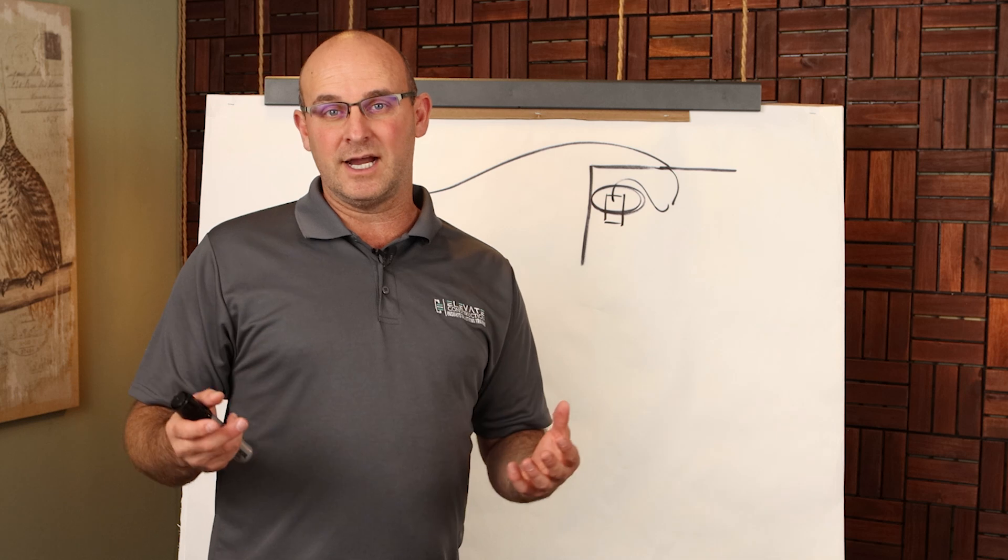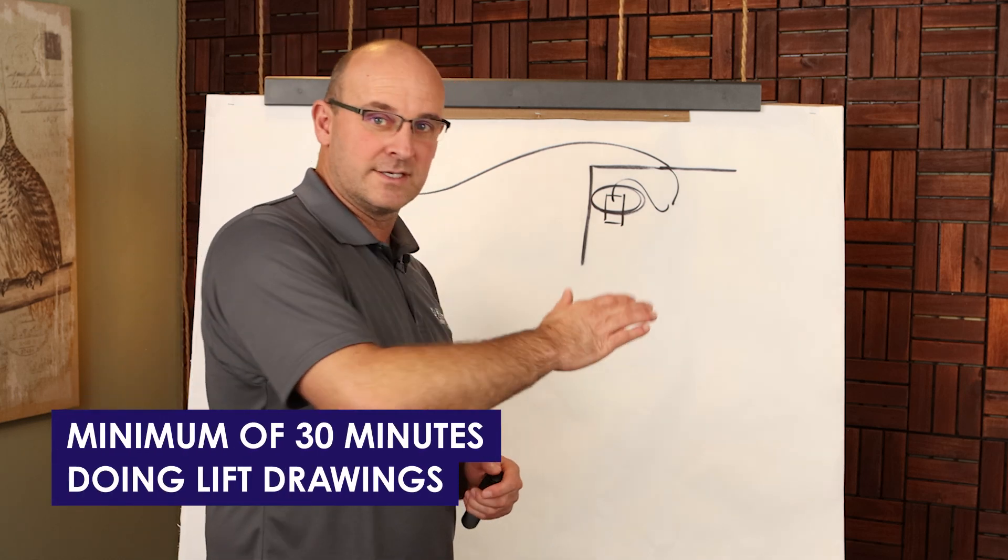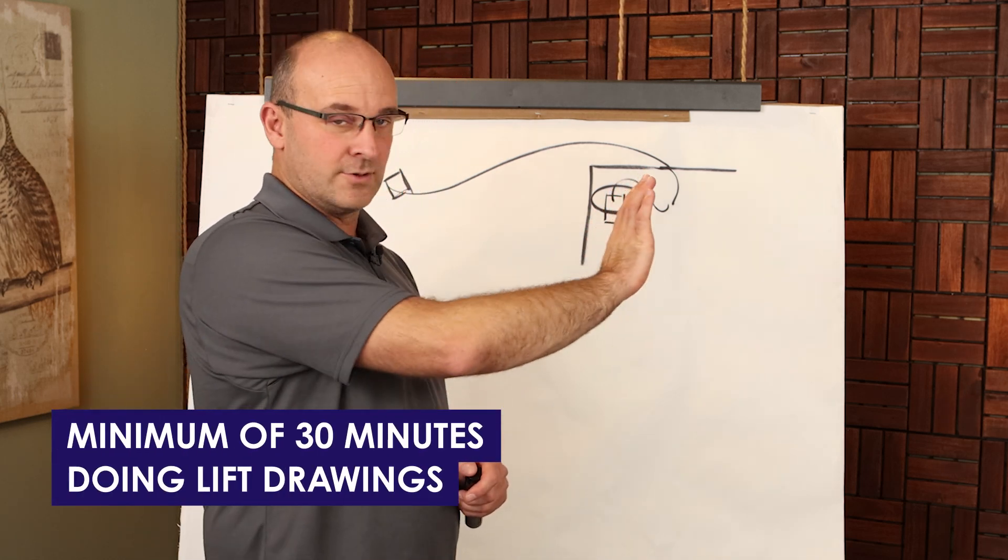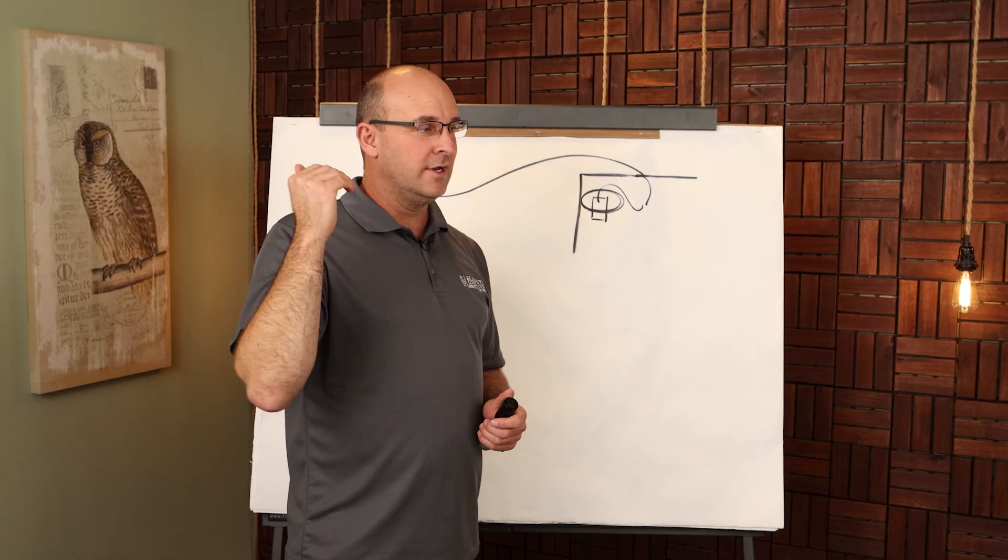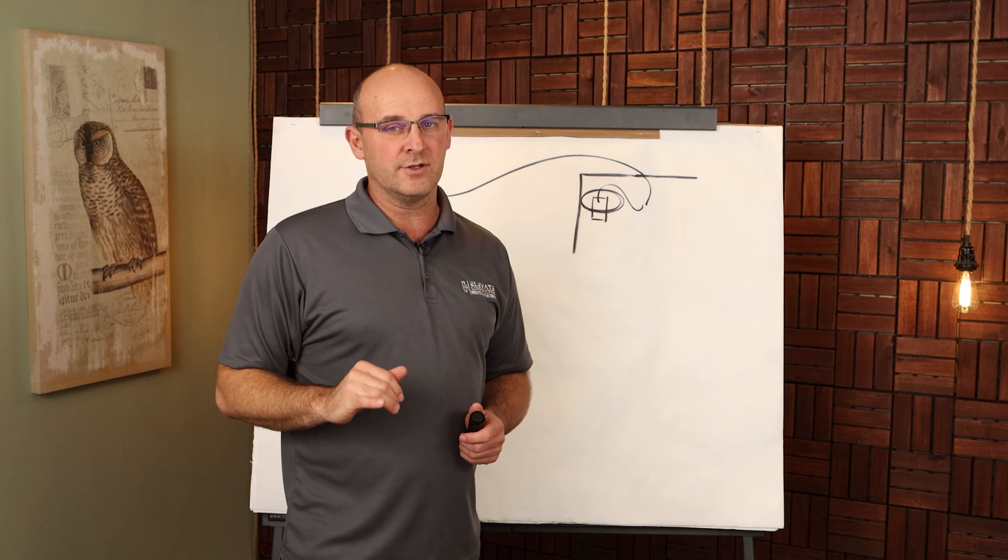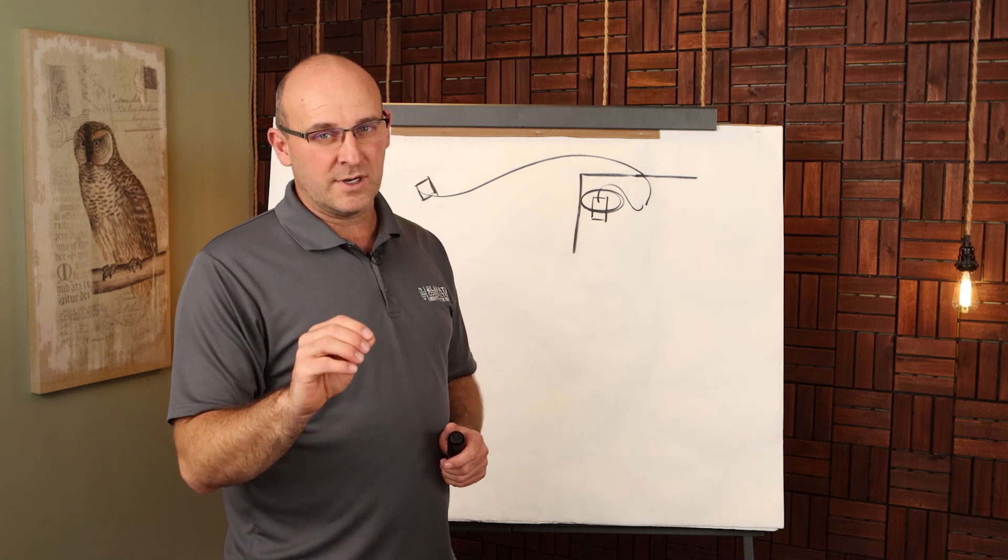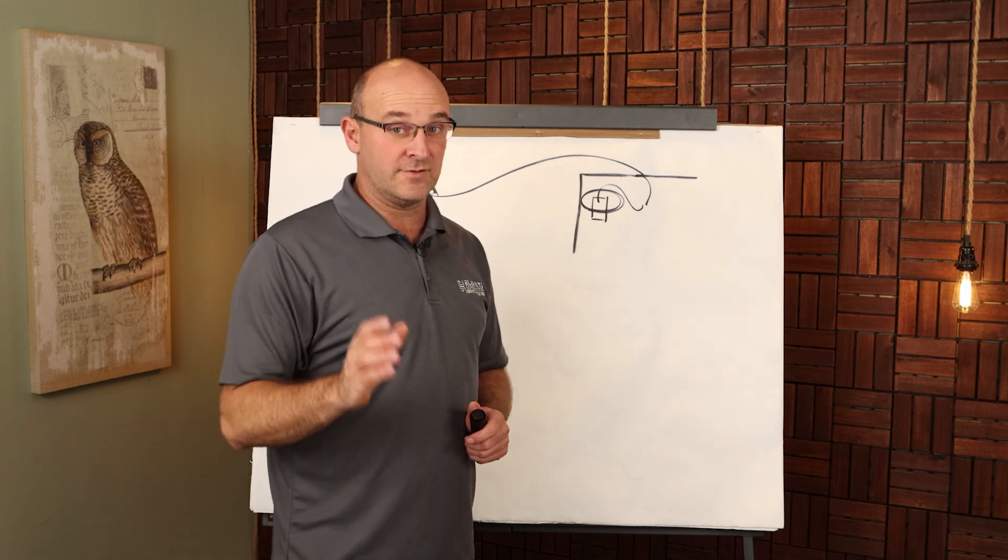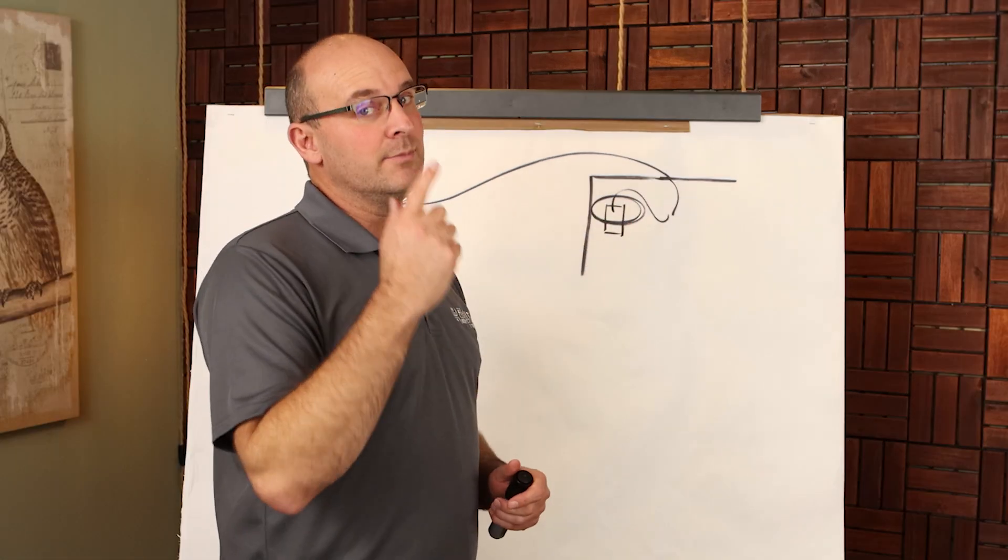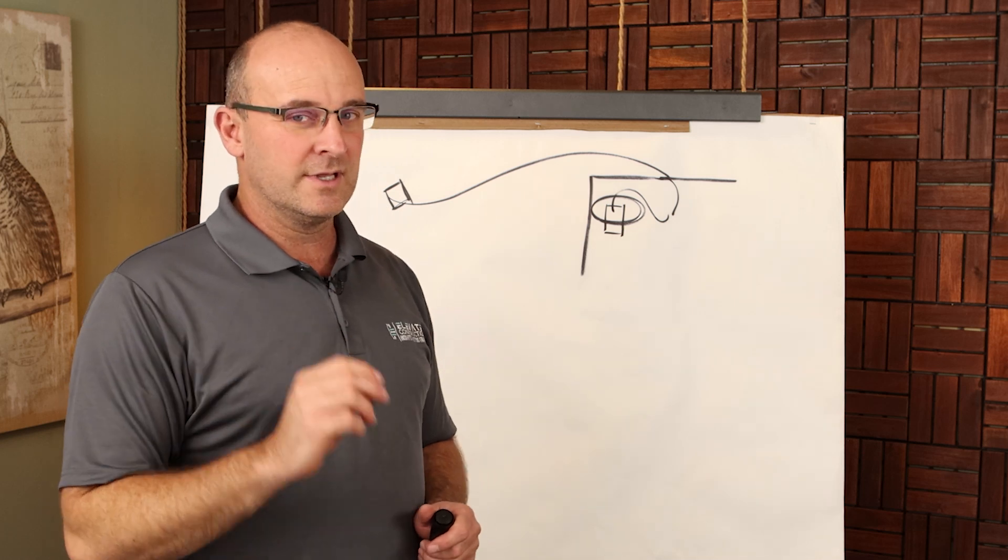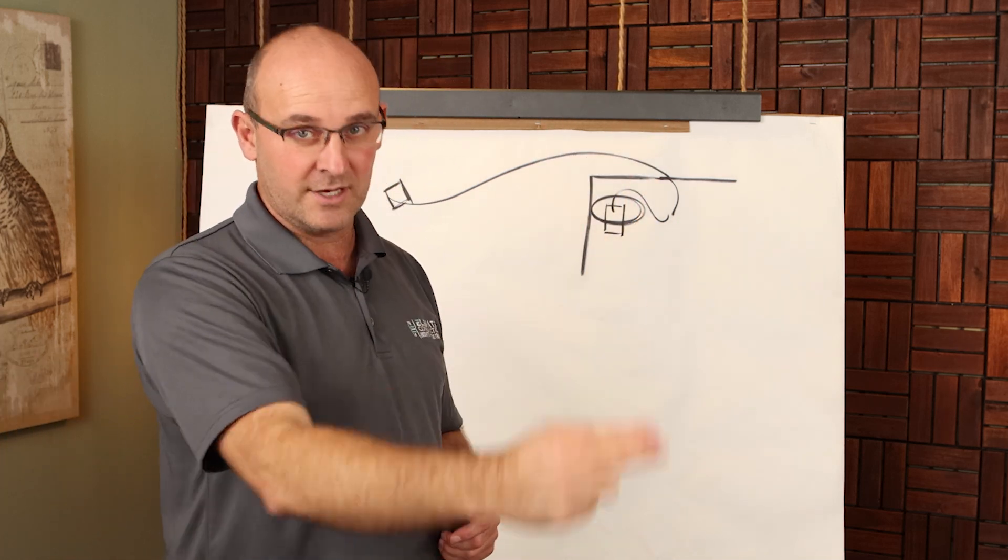Spend 30 minutes or an hour, minimum 30 minutes, doing your lift drawings. This is where you have quiet time to flip through your drawings or look at them on Bluebeam on the screen and to literally work in AutoCAD or Revit or Tekla or whatever program you're using and detail out those lift drawings. That really focused quiet time will save you so much because if you're doing it during the day it'll be what do you need, what do you need, what do you need and you'll lose focus and miss something. With lift drawings when we're combining information we do not want to miss something. We want to work in a focus.